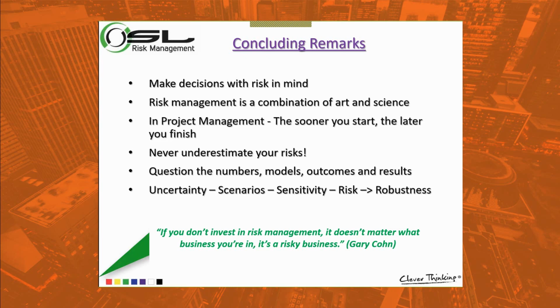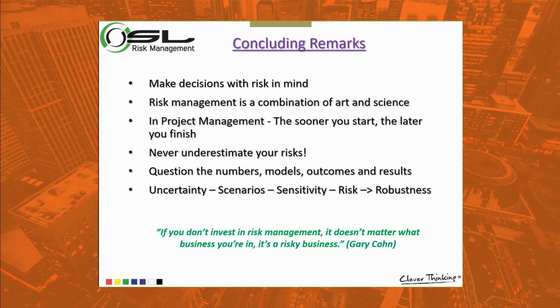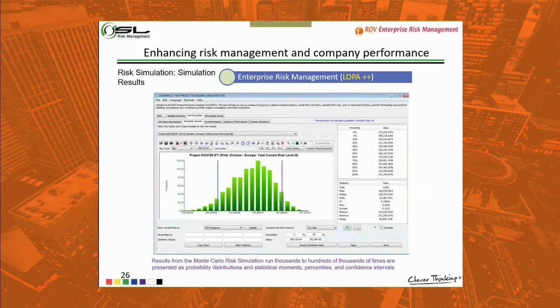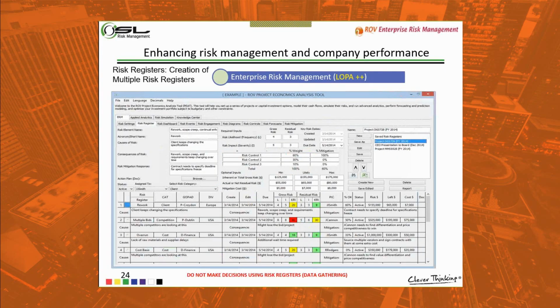Thank you. We don't plot quantitative risk management or quantitative measuring in a heat map. Okay? A heat map is only qualitative analysis. In quantitative risk management, we care about these profiles, understanding the quantitative impact of that profile. For doing that, for every risk register, we try to understand how to quantify the impact of that risk that you are identifying.